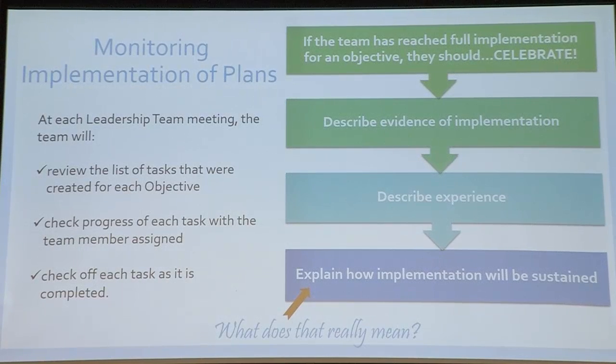And then the last part, but very important part, is monitoring the implementation of the plans. So once leadership teams have created even one task or multiple tasks, there should not be a leadership team meeting that happens where the team is not looking at the tasks report. The task report will show you all of the items that you created as tasks, and that's your work. That's what you're saying you need to do to implement these successful practices. So make sure to include the task report in every single leadership team meeting.